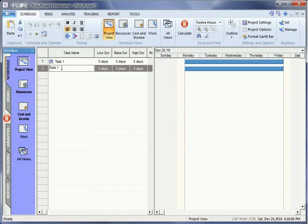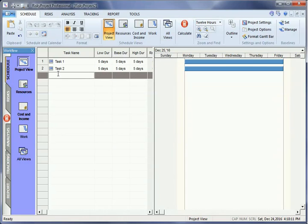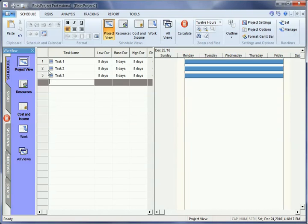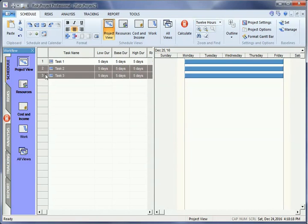Now you may add links between tasks. Select the two tasks from the Schedule and Calendar groups, and click the Finish to Start button. You can now see that Task 2 is the predecessor to Task 3.